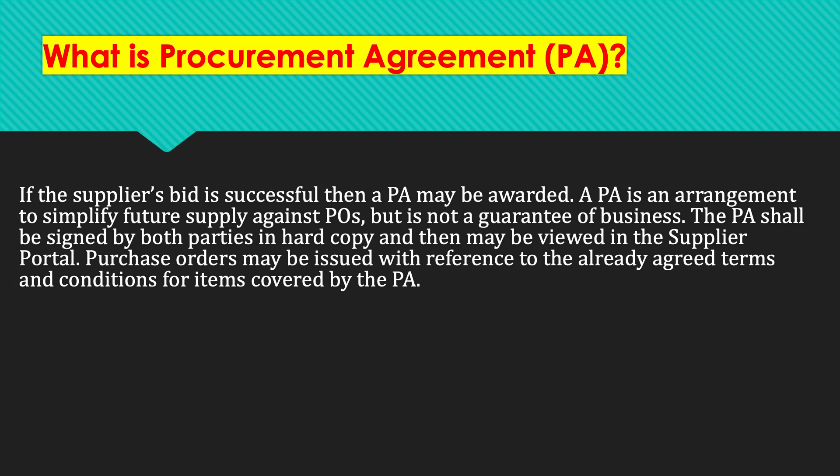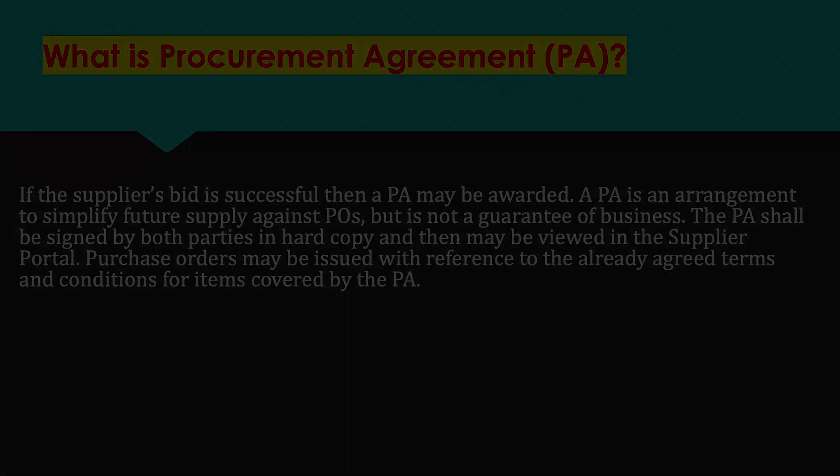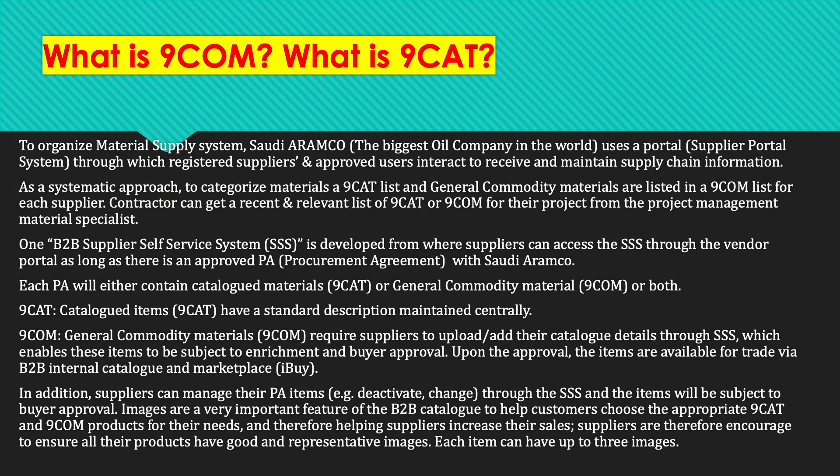What is a procurement agreement or PA? PA means procurement agreement. If a supplier's bid is successful, a PA may be awarded to the supplier. A PA is an arrangement to simplify future supply against purchase orders, but it is not a guarantee of business. The PA shall be signed by both parties in hard copy and may then be viewed in the supplier portal. Purchase orders may be issued with reference to the already agreed terms and conditions covered by the PA.